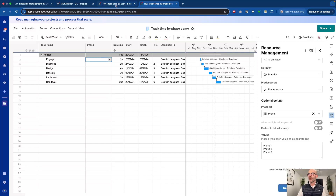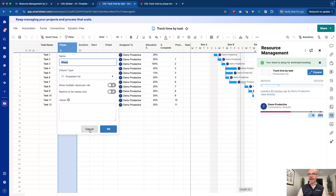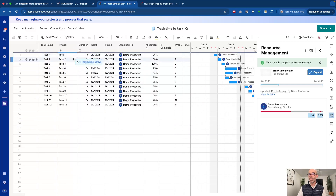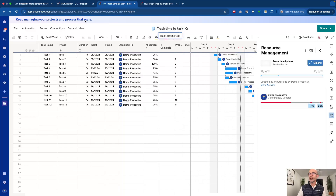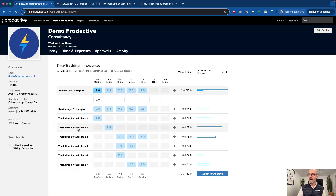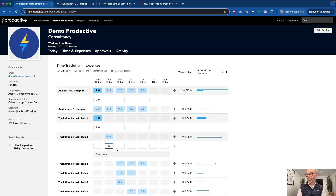What I got more excited about was the fact that I could actually use a formula in this drop-down column. It's still a drop-down, but there are no preset values in there. Because I've got a formula, all I'm simply doing is saying: take the task name. So by taking the task name and putting it in the phase, I can now track time by task. And this is all set up here. If you look at 'Track Time by Task' and go back to the view here, it still lists the project name, but what comes after it is the task name. You can see I've got Task 2 — I spent four hours on that one, actually three hours on that one. And Task 3 — eight hours, well actually I spent six hours on that one.